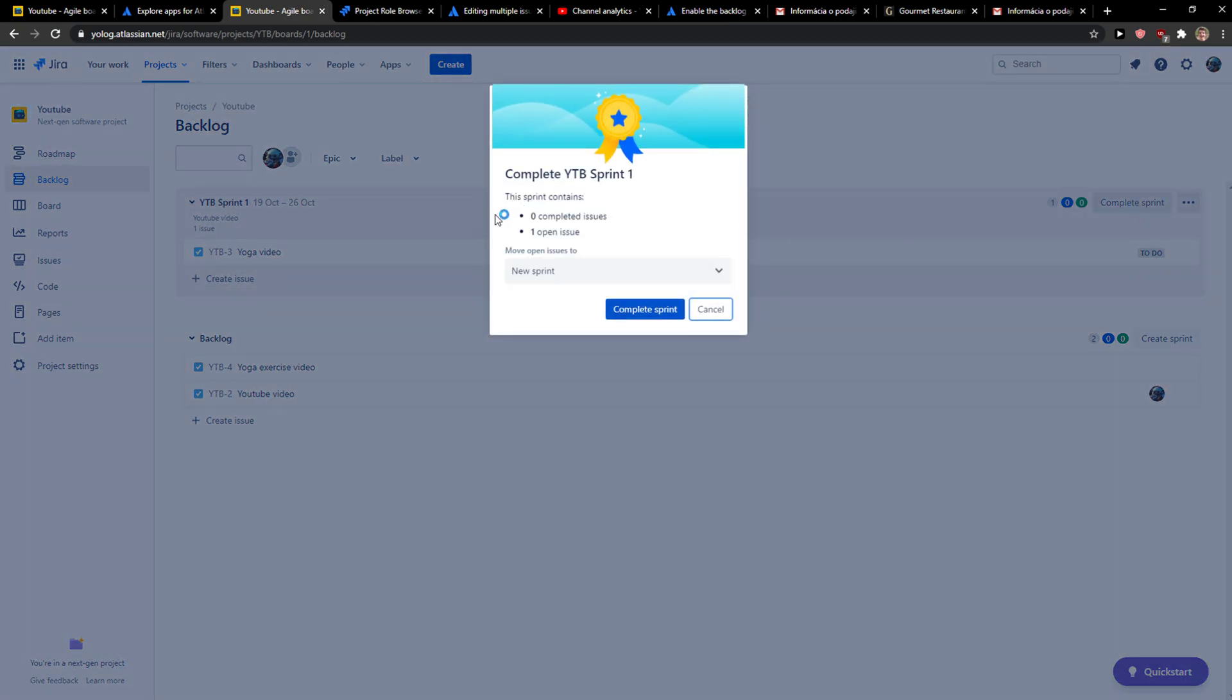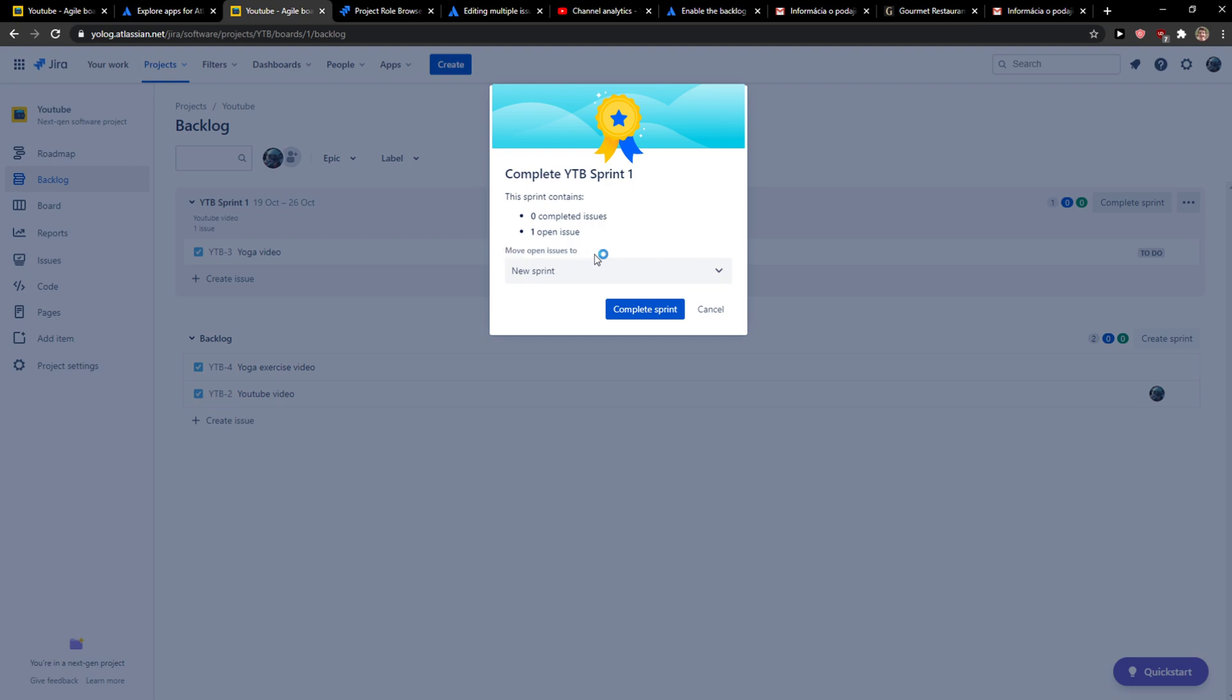complete the sprint and now move open issues to new sprint.